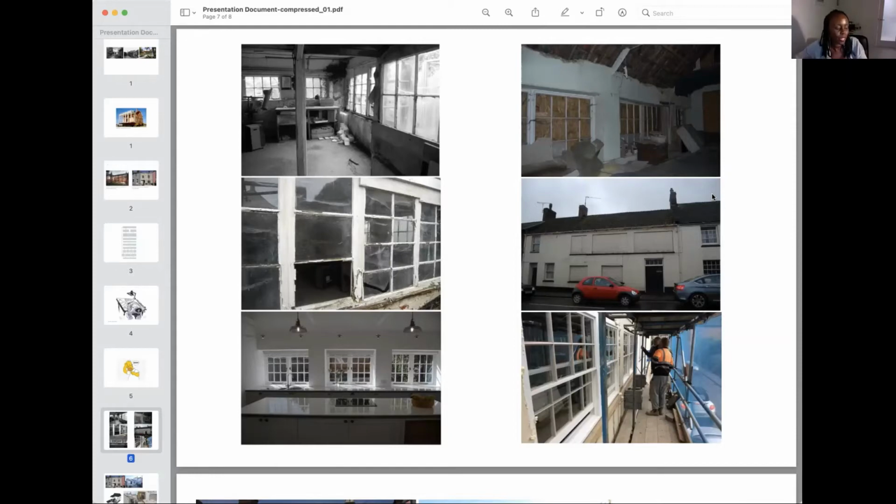And finally, there is issue number 7. When construction on a historic building gets underway and the contractor starts to poke around, they can be presented by one unending can of worms. We cannot guarantee what we will find in such buildings, because often these properties either haven't been touched for a very long time or maybe not at all. This can mean we have to produce further information for the contractor, which we may not have previously agreed to. So the amount of information we agreed can naturally increase.